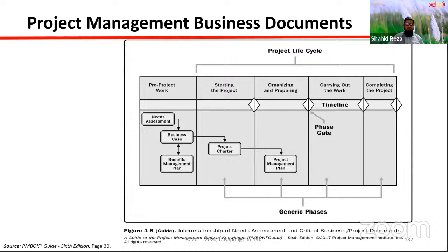And if you have experience, you will know, most probably Nasser Bhai knows, that in big organizations there is a separate department that actually works with these business cases. They ask for business cases from different departments in the middle of the year, for next year. They collect all the business cases, then analyze them. And one solid team, especially from a finance and business background, does this work. They help to create the business case, and they help to approve it. So this is not the responsibility of the project team.